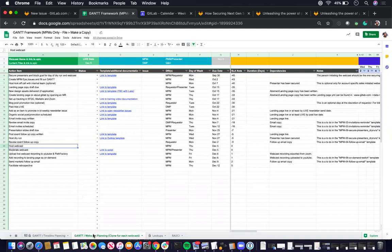Or if you have more than one webcast, then you would basically clone this GAN webcast planning for each subsequent webcast.